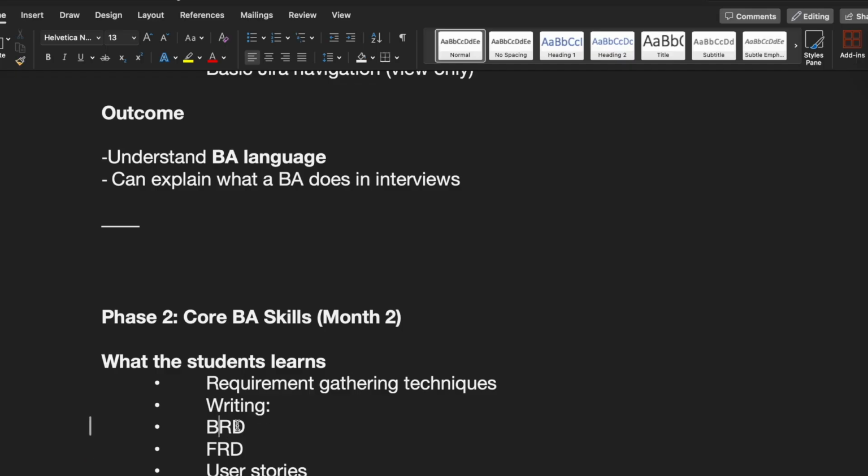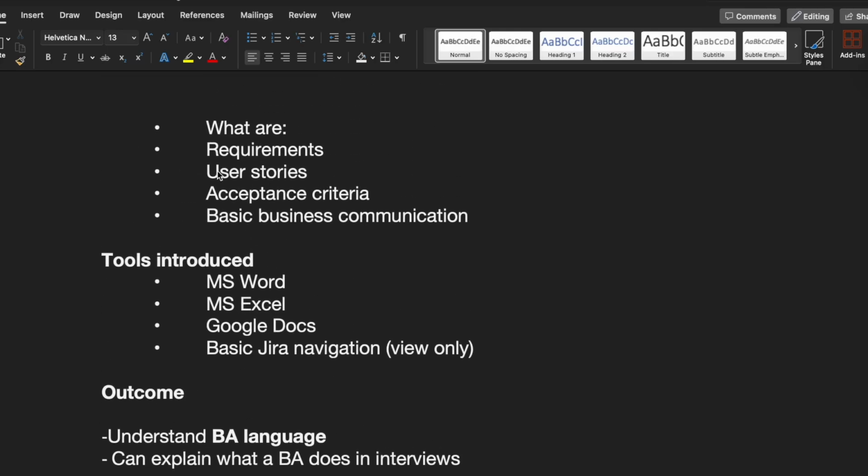I would say do 20% to get 80% of the result. Not do 80% to get the 20%. This is kind of a 20%, 80% bigger job. So instead of focusing on how you write, if you don't understand the requirement, right? How do you write a functional requirement if you don't understand the business? So that's why write your user story, 3 lines only. Write your acceptance criteria. It's like a test case. Validate whether login is working or not. Very simple, plain English. As a user, I want a login button so that I can log in to the website. It's very simple writing.